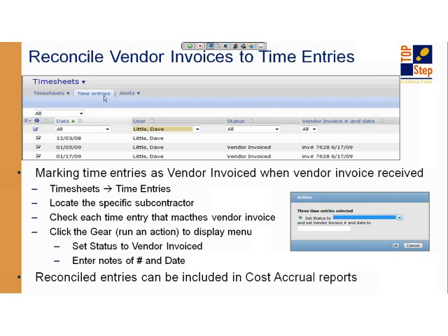So the subcontractor is putting their time in the system, and you get an invoice in the door. And the invoice says, invoice for the work performed in June, 72 hours. Okay. So you take that invoice and you go to your Time Entries tab and you filter on the date for the month of June, and the person who works for that vendor. And you literally look at the hours and see, do they total up 72 hours? And if they don't, then the fun begins. How do you find out where the mismatch is? Maybe you call up the vendor to say, hey, can you give me a detailed time list because it's not reconciling to my records for the month of June.